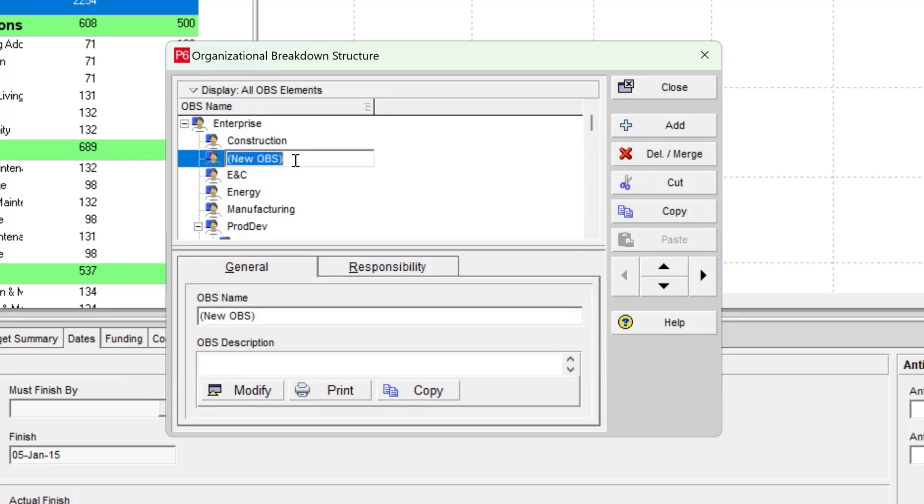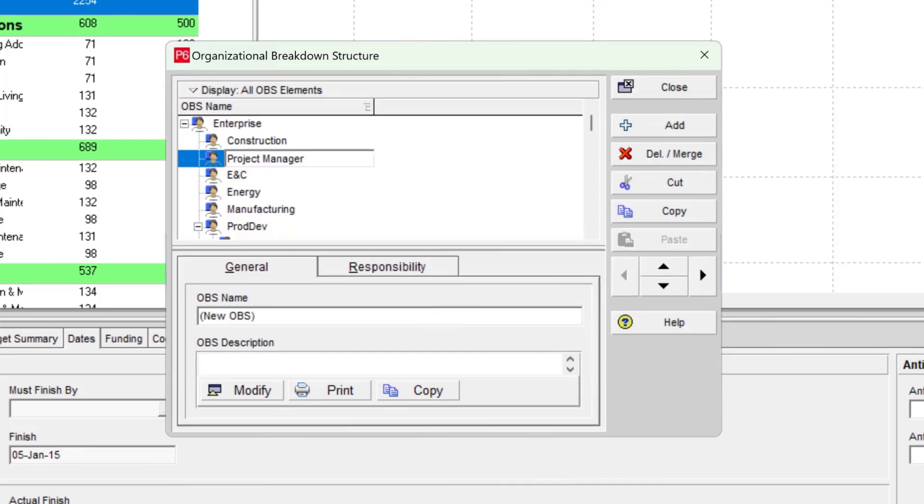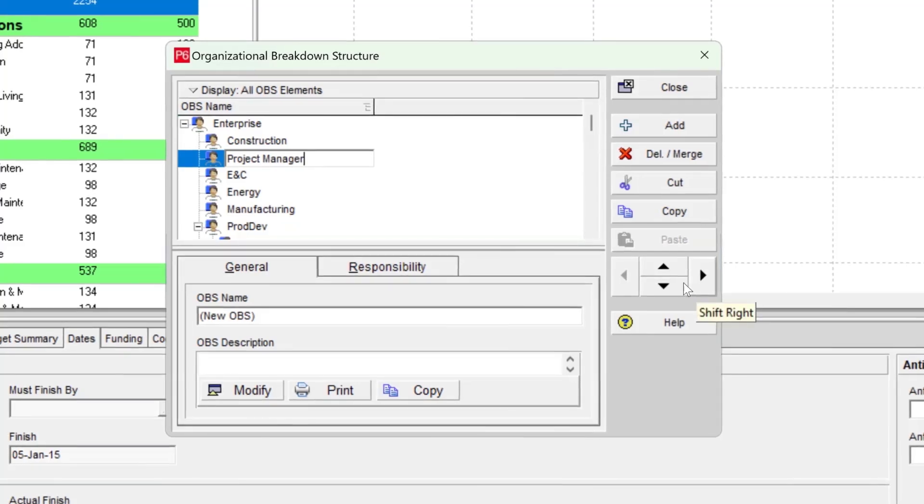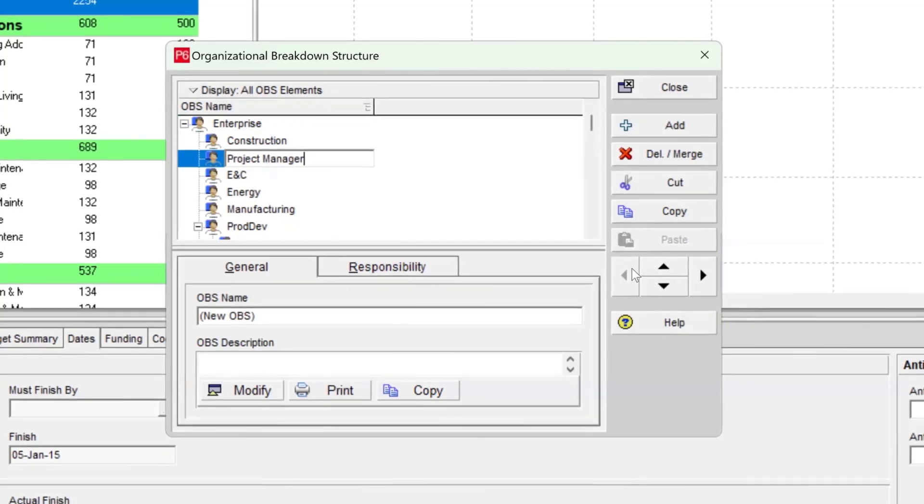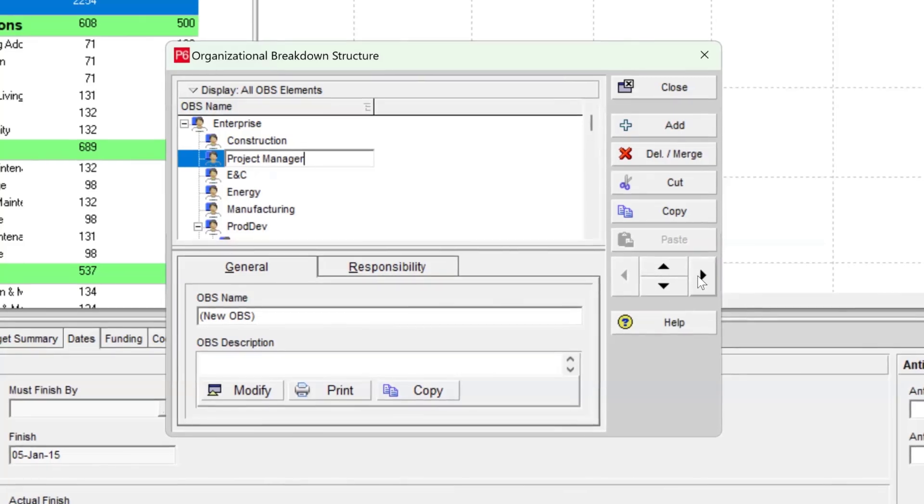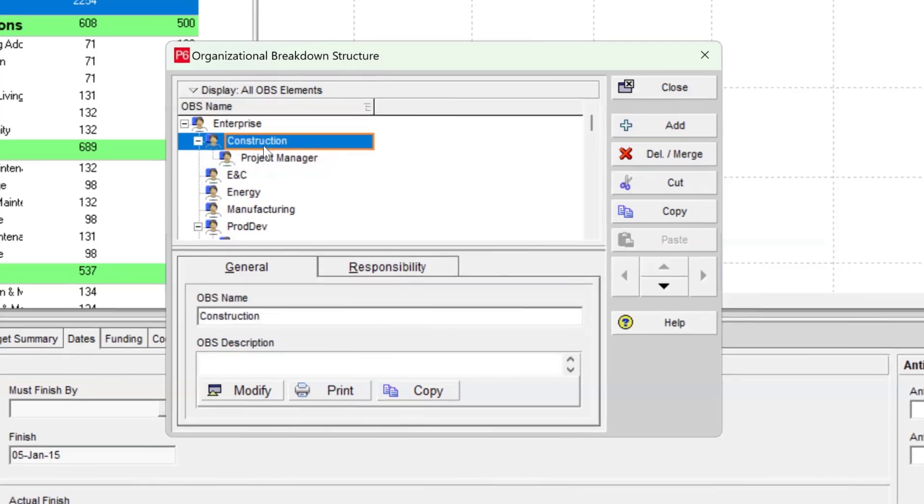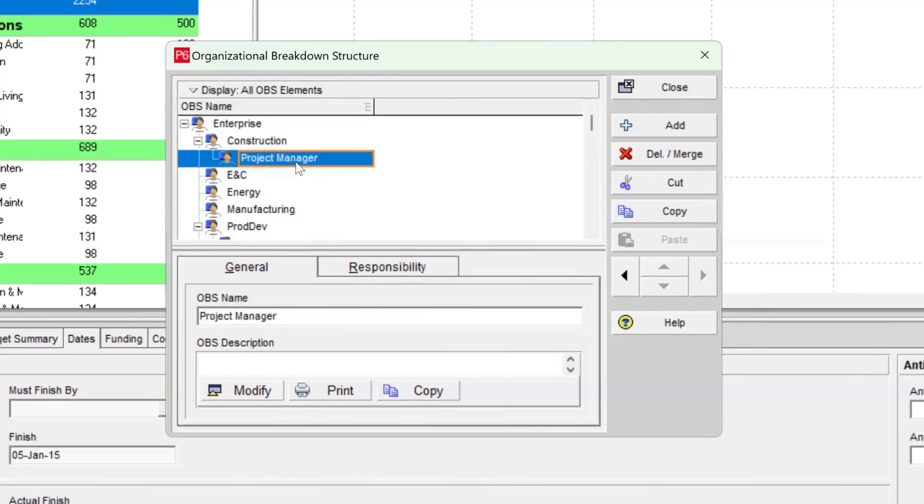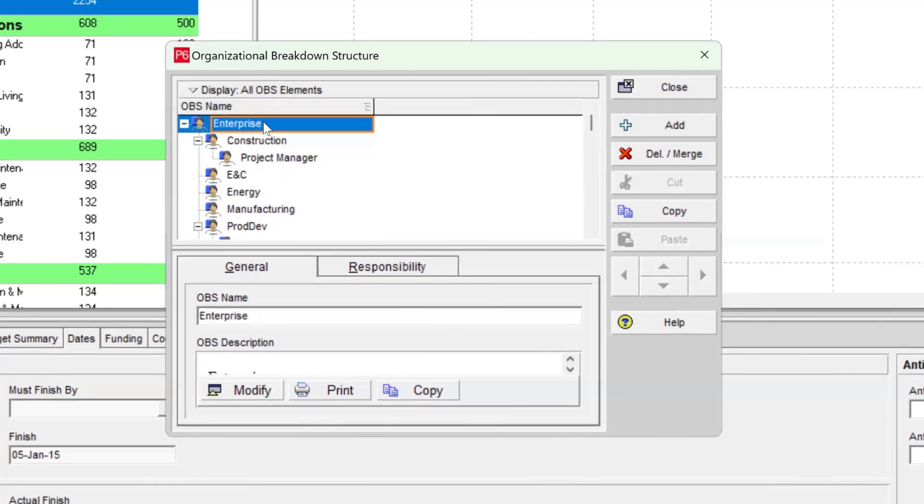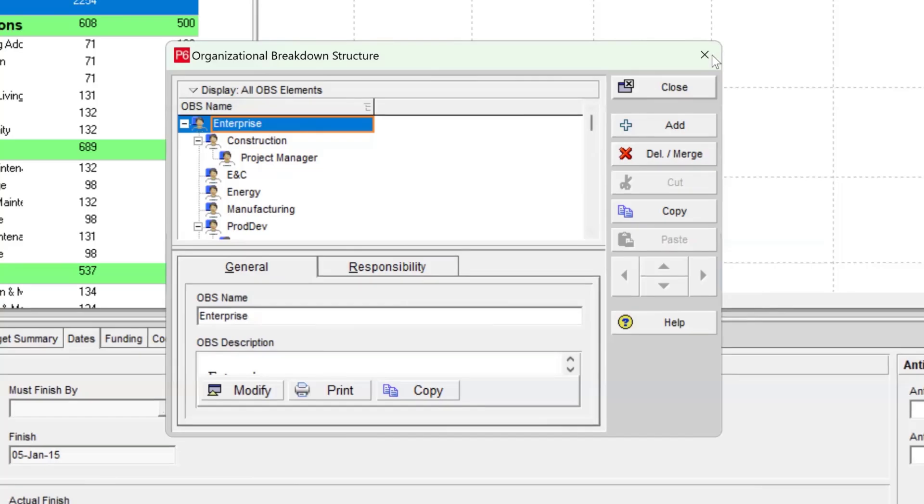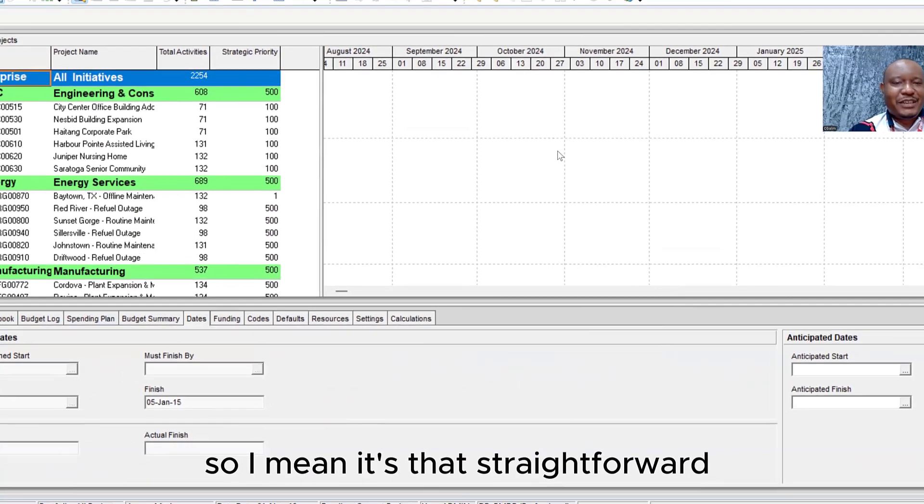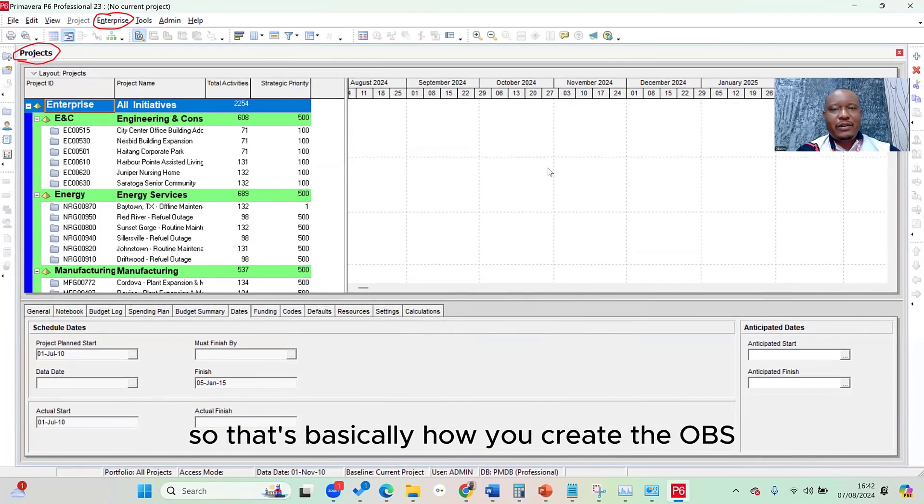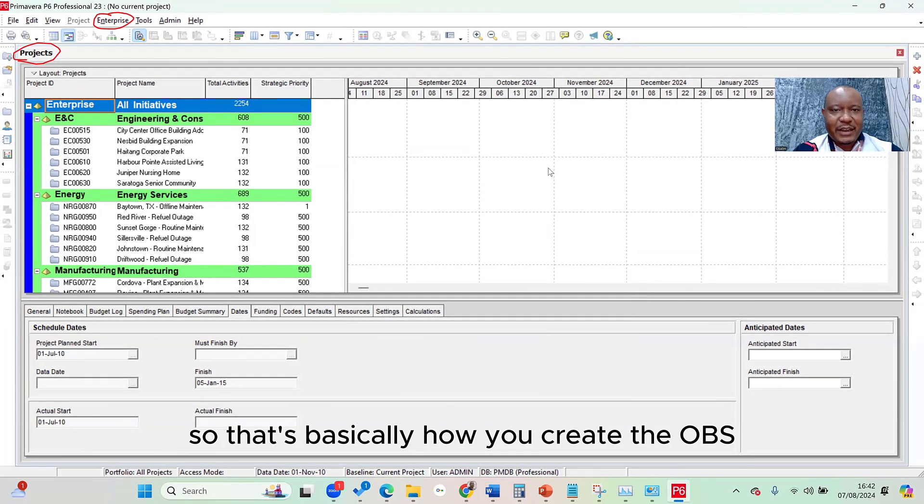And so this second one is the project manager. So you just type in project manager. Because the project manager is under the construction department, I would like to shift it right one step. So you'll see the shift right button here, these four directional arrows. Let's click on the one that is pointing right and then it shifts it right. So in this case, you have the project manager who of course reports to the construction department, all within our enterprise. And then once you're done with that, you simply click on close. So I mean, it's that straightforward. That's basically how you create the OBS.